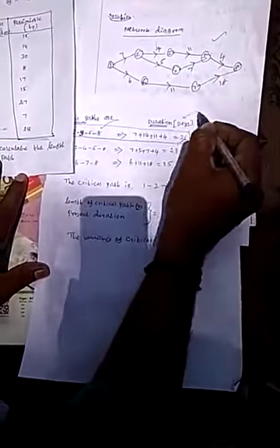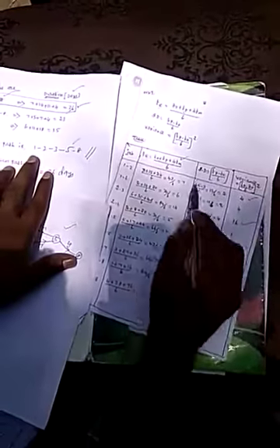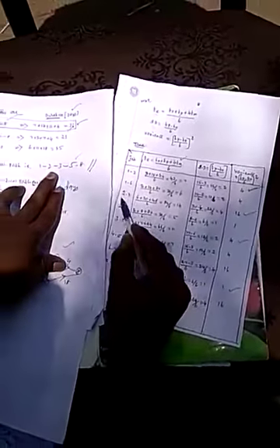Here the unit need not only be days; it could be weeks or hours. So 36 days. Now the variance of the critical path. This is the critical path, so find its variance. For 1 to 2, the variance is 4. Tick. 2 to 3, the variance is 16.